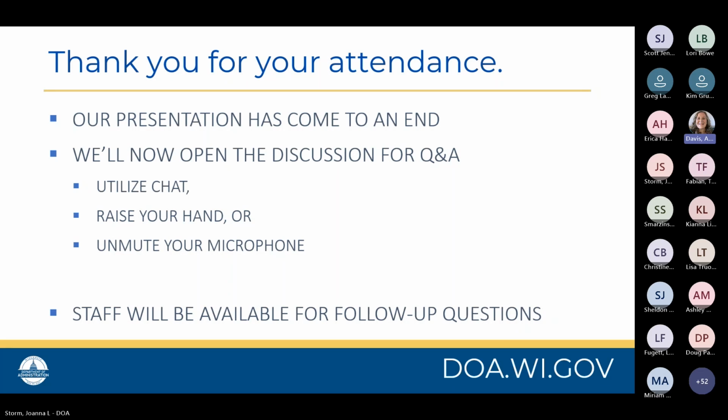We can go back to questions about the grant agreement execution. You had already addressed one during the recording. So an additional item was asking about the deadline for executing the grant agreement, but on the grantee side. We have an expectation that we hope to have the grant agreement executed within 30 to 60 days of receiving the pre-agreement documents. As far as the grantee is concerned, our fiscal team at DOA will send the executed grant agreement to be signed. Typically, they have a one-week turnaround. If you need additional time due to needing certain approvals, or someone is out of town, or the chief elected official isn't available, you can request more time, but we generally expect that to be returned within a week of receiving it.